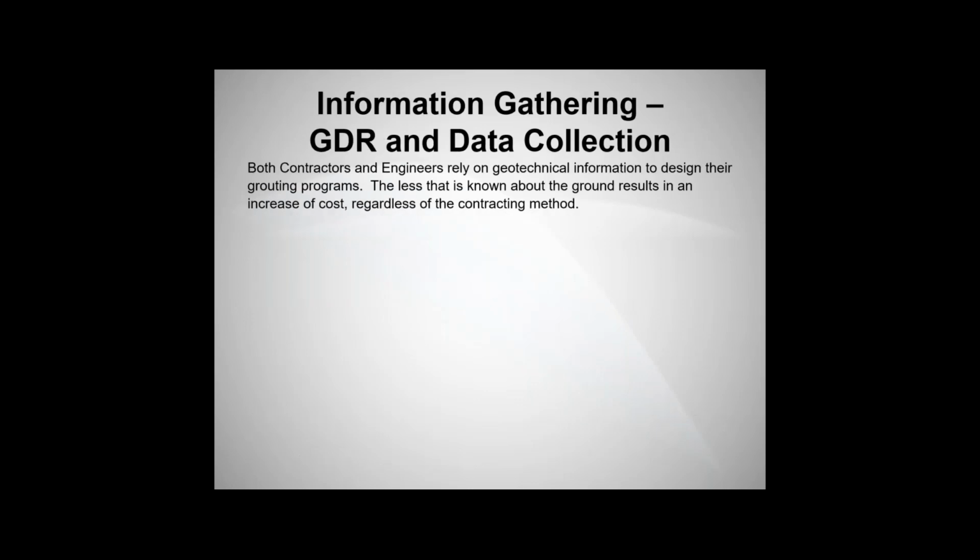As we get into the design details of how to design a grouting program, both the engineers and the contractors are relying on geotechnical information to design. The engineers are using it to design their structures, their shafts, their tunnels, their dam foundations, while the grouting contractors are looking at how they are going to do their grouting program. The bottom line, as we all know, is that the less we know about the ground, the higher the costs.